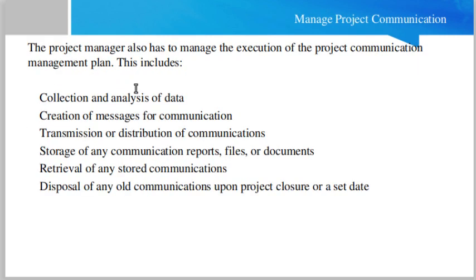Then manage project communication. The project manager also has to manage the execution of the project communication management plan. This includes the collection and analysis of data, creation of messages for communication, transmission or distribution of communication, storage of any communication reports, files, documentation, retrieval of any stored communication, and disposal of any old communication upon project closure or a set date.